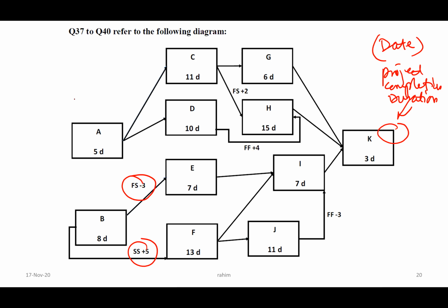So, for instance, this is the first day. If we give you the first day, it will start 1st January 2021. Then basically, if you know this will take, let's say, 45 days, 45 days is basically 100% working days. We do not deduct the holidays yet.